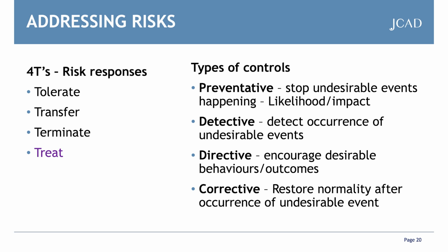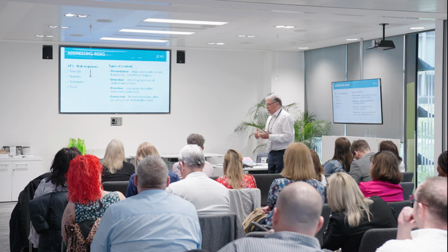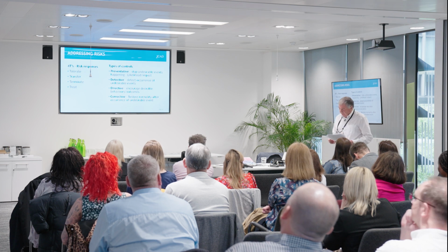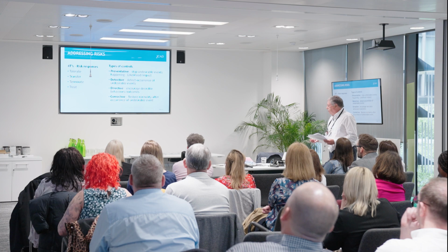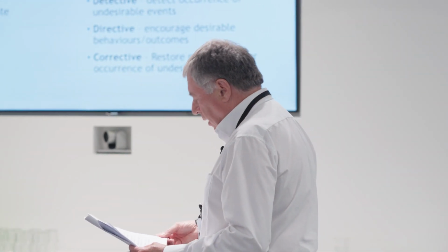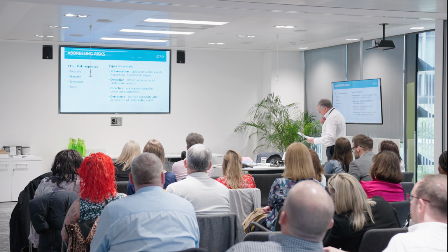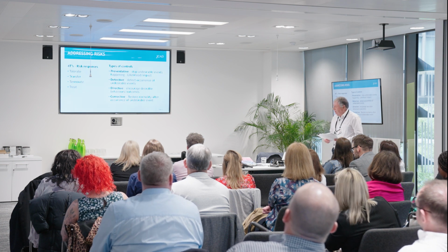So it's just worth bearing this in mind if you are doing something back at base, what type of controls we're thinking about. Preventative action, so those are the ones that we want to take to prevent the tiger escaping from the cage. The detective ones are things like exception and error reports, CCTV, inventory checks. Directive are those ones which we're required to undertake either through procedures or processes, written policies, perhaps through health and safety regulation. And corrective, things like business continuity plans, incident handling, or virus isolation. But there's more information about those types of controls.